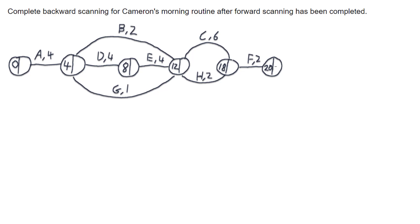Backwards scanning starts at when the project finishes and works its way backwards through the project to work out when is the latest we can start all of these activities. Because we're starting when the project finishes, we put the finished time at the start of our backwards scanning — in the finished node on the right hand side. Then we take this value and subtract off the activity time to give the latest start time. So 20 take 2 gives me 18, meaning the latest I can start F is at the 18th minute, which makes sense — it takes 2 minutes, finishing the project at 20 minutes.